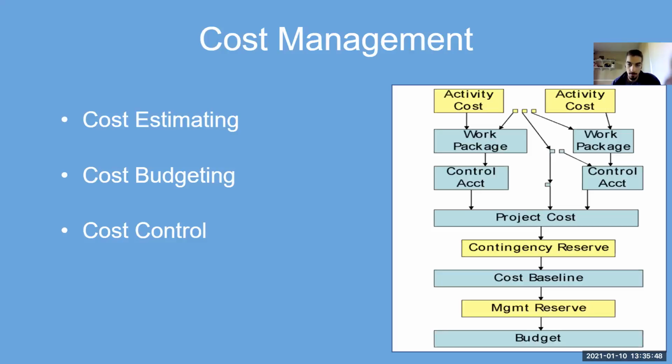You don't want to put reserves on particular work items. You want to put it on the whole project to spread it out evenly. Putting it on a work item becomes very difficult to track and to figure out where to go back and adjust your reserves, because as you grow in your project, you have more visibility into reality and your risks drop and your reserves will also drop. So at the beginning of the project, your reserve can be up to 15% and it starts to drop as you start implementing. And as implementation starts, it can even drop as low as 8% or so. So you want to be able to change it in one place and not go through 1,000 rows of expenses.